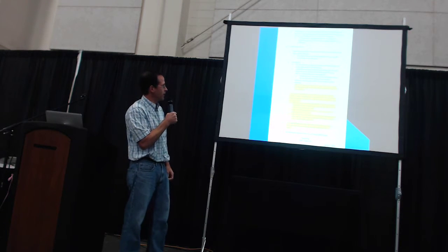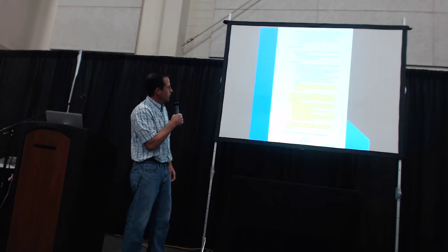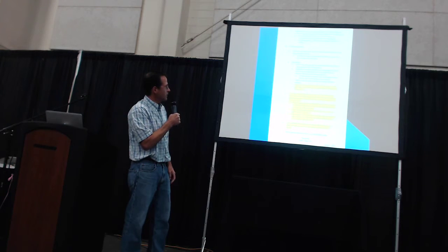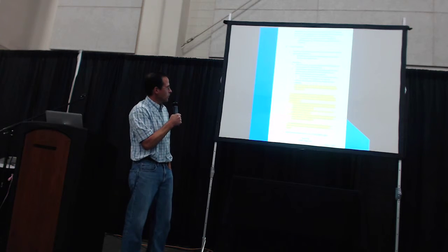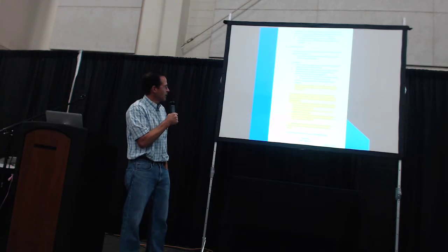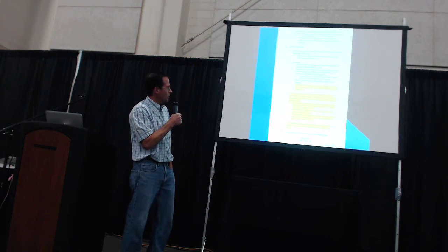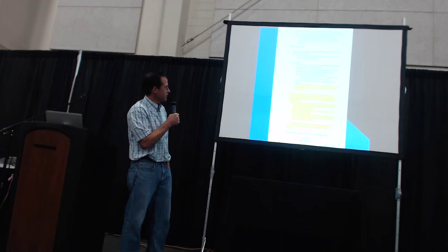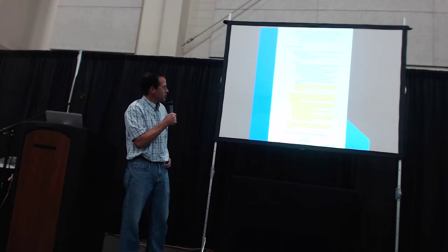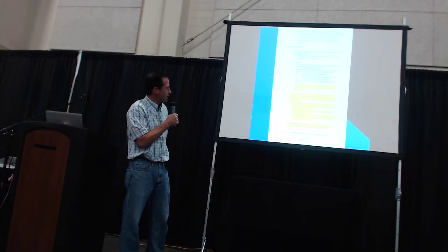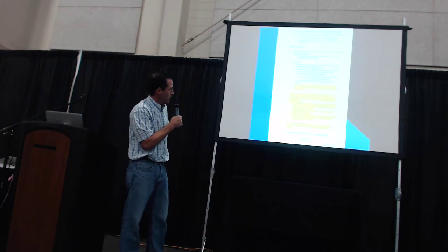Keep driven piles within 6 inches of the designated plan location and within 2% of vertical plumb throughout the total length of the pile, including bending. This is roughly equivalent to 1/4 inch in a foot or 0.6 inches in 30 inches. Receive approval from the engineer that these criteria have been met at the end of the pile driving before proceeding with backfilling or other associated foundation work.